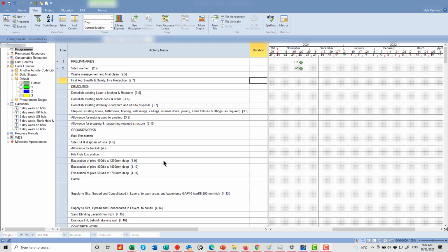So I've just gone over to Asta for a second because I want to show you something. When you put the hours in for duration, you want them to go in the way that Asta likes the format. So the real point is that the unit we have in the Excel spreadsheet is hours, and Asta will take seconds, minutes, hours, days, weeks, whatever. So if I type 1W, that's 1 week. If I type 1 day, see that's 1 day. But what of course I want is to have the data come through as hours, so it'll be 111H like that. So we're going to have to bring our data through with an H at the end of the number.